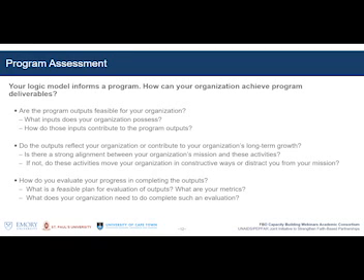And there were elements of process evaluation, which was simply to understand the people who signed up, the people who participated in regard to their roles in an organization and who was represented among the audience, to understand general kinds of assessment of the event itself from those participants, whether participants found the content useful and helpful. That's a process evaluation.